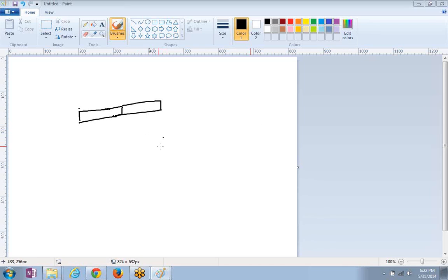Okay, look at this. 2 weeks of work, 2 people here, 2 people here. Right? Now, what happened? What is the planned value? 4 person weeks. Right? This is PV. Now, at the start of the work, only one person is able to work, other person got sick. He worked for 2 weeks.